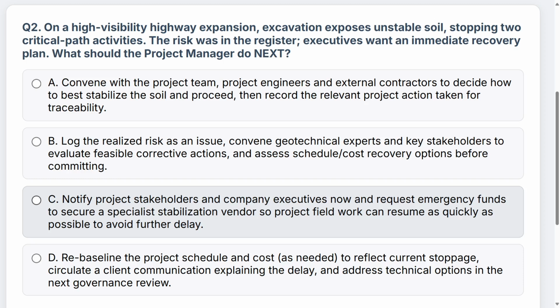Let's go to B. Log the realized risk as an issue. Convene geotechnical experts and key stakeholders to evaluate feasible corrective actions and assess schedule or cost recovery options before committing. Now that sounds like a wise thing to do because you're not prescribing the solution before assessing what the problem is.